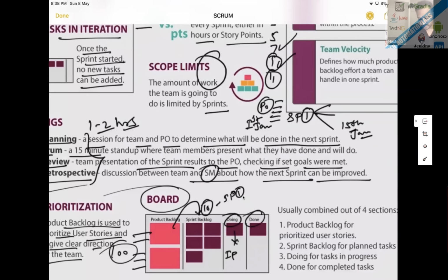And then whatever is done, completed after the demo, we will mark it, okay, this particular story is done, actually completed. So let's say out of 10, you have completed 8. And then 2 are not completed. There are still some blocking issues, or dev could not get time, or QA could not happen properly. In that case, we will move this particular story to sprint number 2, actually the next sprint. So the same story will be moved to the next sprint like that.